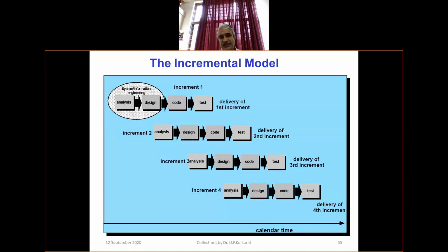Under this circumstance, the financial constraints, I go for increment. I do not develop everything, put all my workforce on that, and develop things in parallel. No, I don't do that. I pick one particular increment with a high priority for the customers. I develop it, which fits in this year's budget, though the total overall project sanctioned is 1,000 crores. This is one of the reasons.